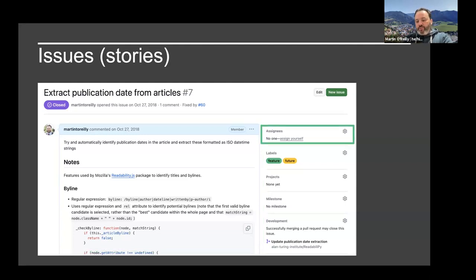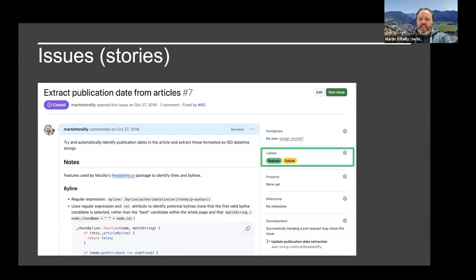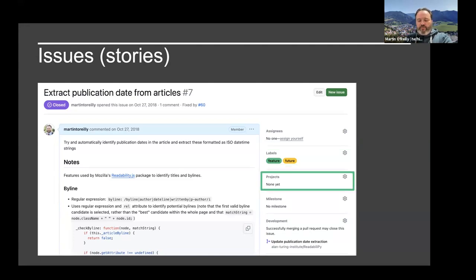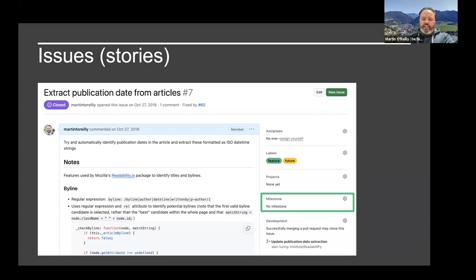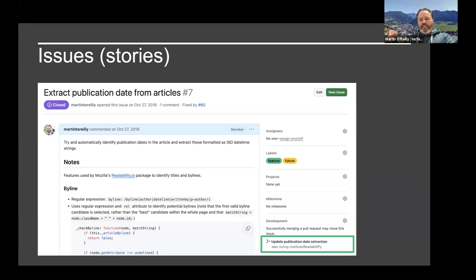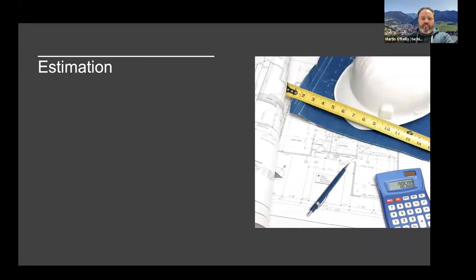In GitHub's implementation you can assign people to an issue and people can subscribe to be updated when comments are made, making effective asynchronous collaboration easier. You can label things — importance level, size, whether it's a feature or a bug. You can attach it to a project — the board showing what you're doing, what you've chosen to do, what's being worked on — and associate it with a milestone, which is really helpful for filtering to see what you're doing this sprint. Finally, you can connect it to actual code changes, so you can see where the change that delivered a story was made.